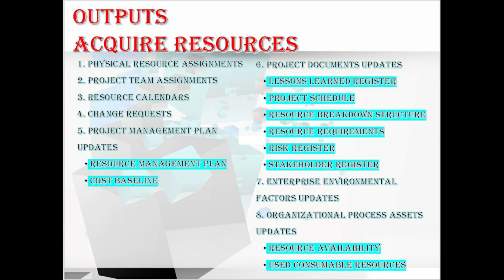Moving to the outputs, first we have physical resource assignments. This documentation records the material, equipment, supplies, location, and any other physical resources that will be used during the project. Next is project team assignments, which documents team members and their roles and responsibilities, including the project team directory and names inserted into the project management plan such as project organization charts and schedules. Resource calendars identify the working days, shifts, start and end of business hours, weekends, and public holidays when each specific resource is available and assigned.